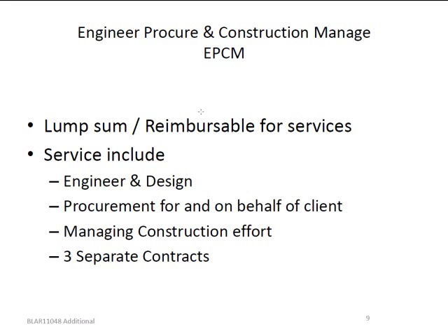Alright, when we look at the EPCM, this is typically the fastest growing contractual strategy in Australia, where we have the engineering, procurement for and on behalf of, and construction management. Alright, so remember, there's one part over there, engineer, which is the same as drawing or designing. Procure for and on behalf of, important, so that means that the invoices will have the employer's name on it, but the procurement itself will be done by the EPCM contractor.